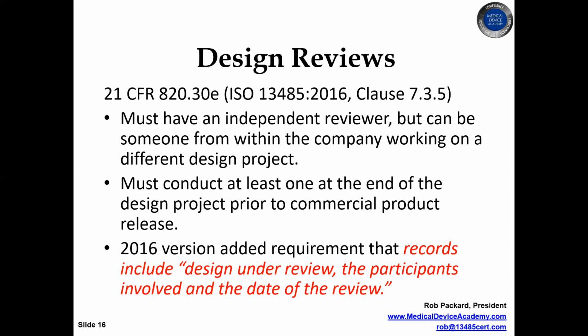The whole point of doing design reviews is to verify that all the activities that you had planned were done and to make any updates to your plan before you proceed to the next phase. So instead of worrying about having really long design reviews, have short, efficient design reviews and have many of them at each phase and update your plan for the next stage rather than having one big long one at the end. It's much more consistent and much more predictable for management if you have a bunch of short ones at each phase. And that way you can say, whoop, this isn't done. Before we go on to the next phase, let's make sure we get this piece done. And let's update our plan.